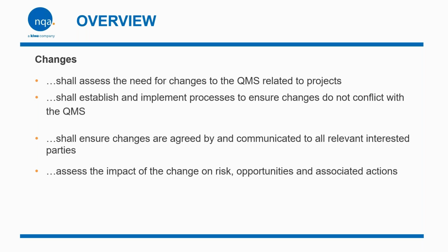Shall ensure changes are agreed by and communicated to all relevant interested parties, and assess the impact of change and risk, opportunities, and associated actions. So all relevant interested parties, including internal teams, contractors, clients, and regulators, must be informed of any changes and also have the opportunity to review and agree before any implementation.